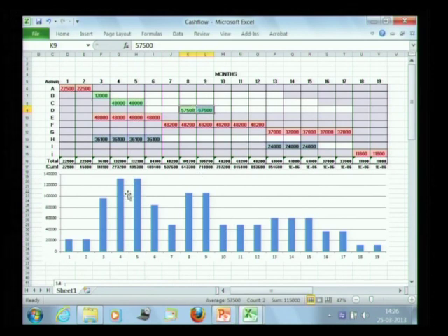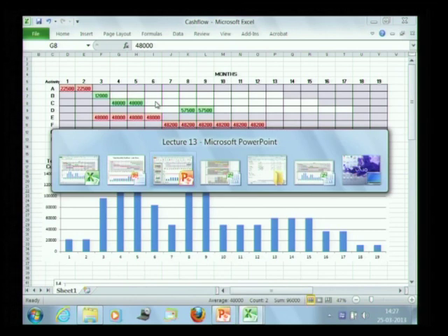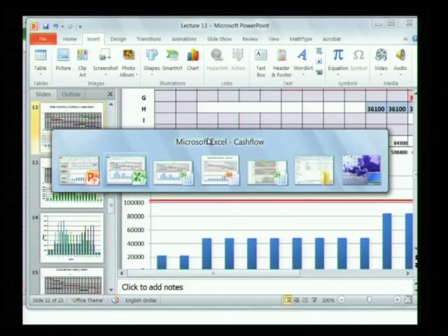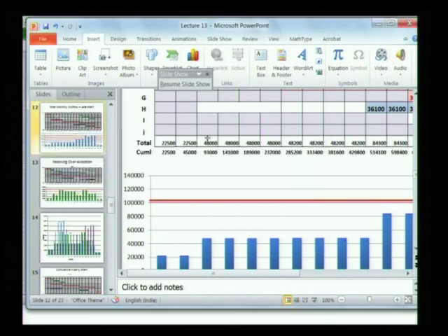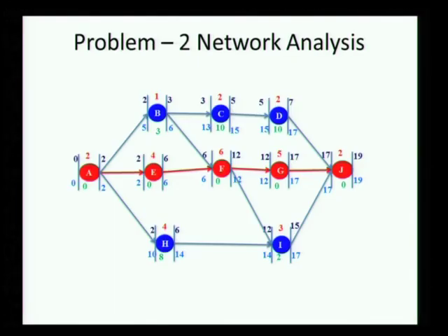So even now we have exceeded 100,000. So let's explore the possibilities with which we can work so that this is below 100,000. So now let's discuss how far can I move C? Remember, you can move it all the way, but it's still constrained with precedence. It is still constrained with the D. Yeah, I can't move C beyond D.